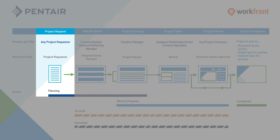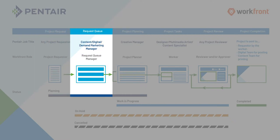This form will then send populated data to a request queue manager. The person who runs this part of the process is dependent on your segment. This person is in charge of approving the project, turning it into a work in progress, denying the project or canceling it, or putting the project on hold until they can gather more information.